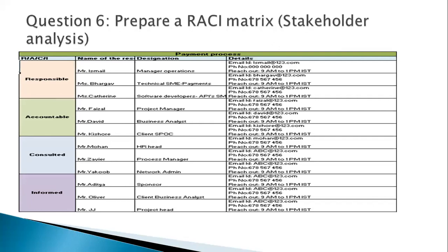So in order to understand the RACI matrix carefully, organizations create the RACI matrix for the first 6 months. They work on whatever features or functionalities you have decided. Once these first 6 months are finished, they create one more RACI matrix and again do the same. In real organizations, guys, please understand that RACI can be done on very important functionalities, on modules, on months, on the project.